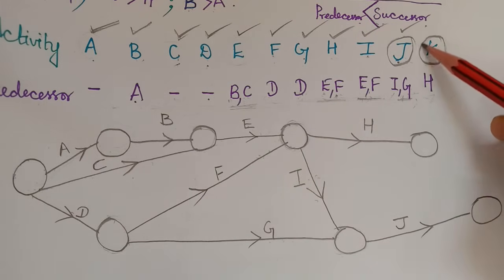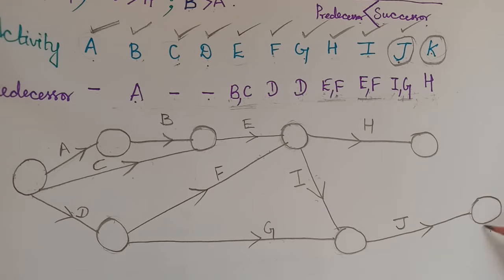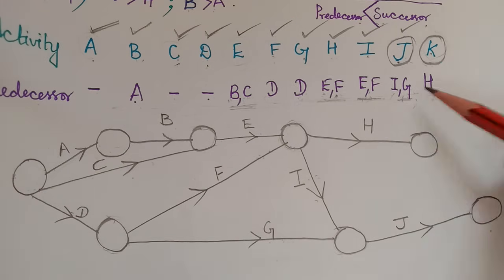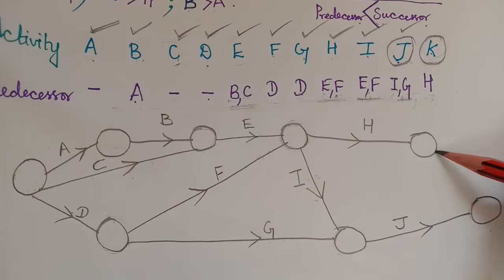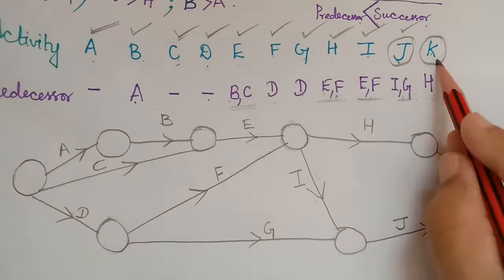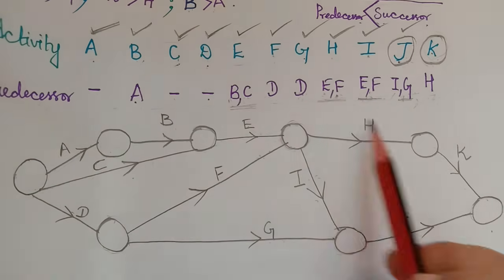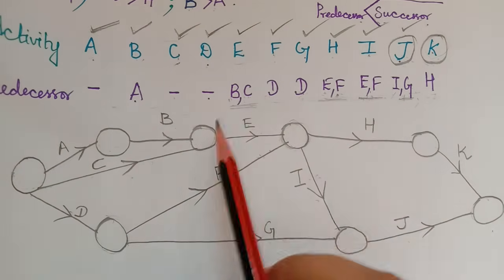Finally, activity K is also an end activity and must terminate at the same end node. The predecessor for K is H. So we draw activity K from H's end node to the final end node. J and K are the end activities, and all activities have now been drawn as per the given data.